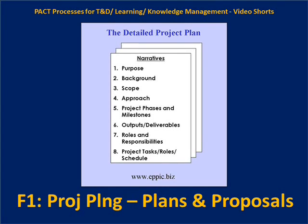The detailed project plan has eight parts: a purpose, a background, the scope, the approach that's going to be used, project phases and milestones, outputs and deliverables, roles and responsibilities, and then the task charts — the schedule for going forward and doing the project.